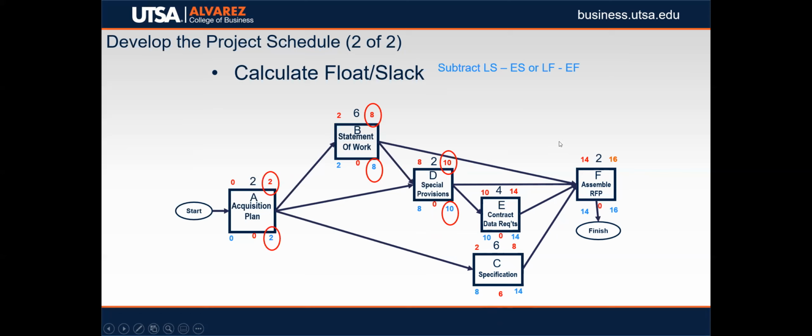So to calculate our critical path, all we do is follow the zeros. So you see from A to B, there's zeros, and all the way to F, that's a 0. So there's one of our critical paths. But you also notice there's several other critical paths. We also have A to D to F, and then we have these other ones, B to D to E